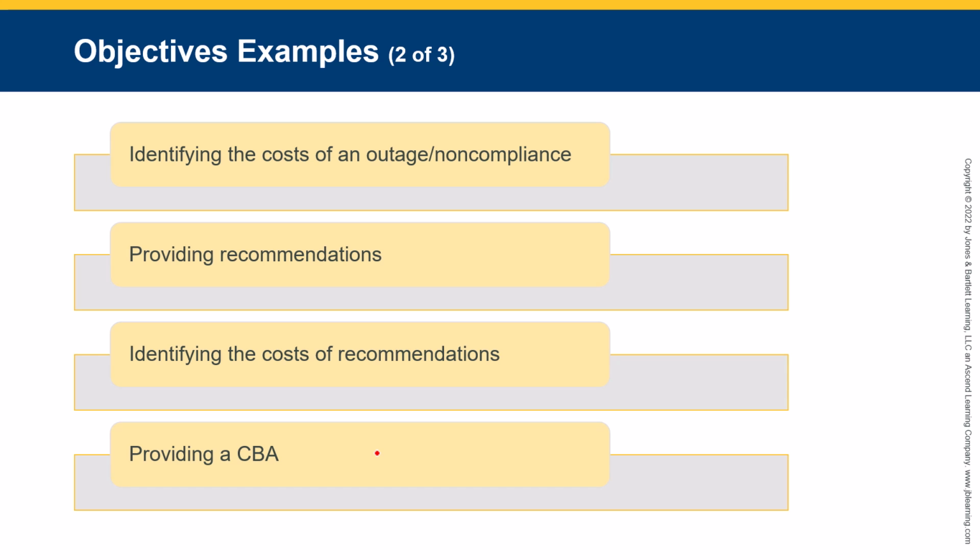Well, we might go, oh, that's not worth it. So we don't do it. If we say, hey, to secure this $100 item, it's going to cost $10,000, and if we don't do that, the cost of non-compliance might be $50,000, for example, then we can go, oh, that makes sense. Cost of non-compliance is higher than the cost of compliance.